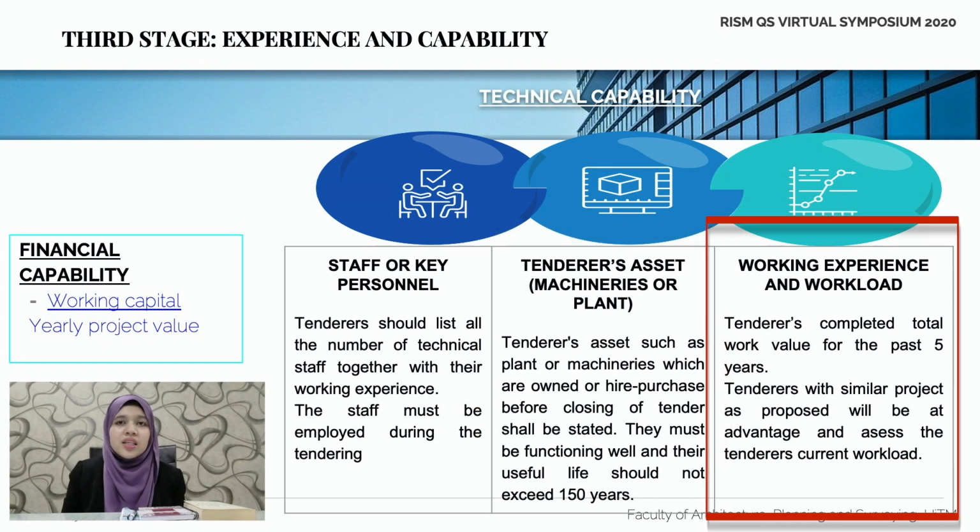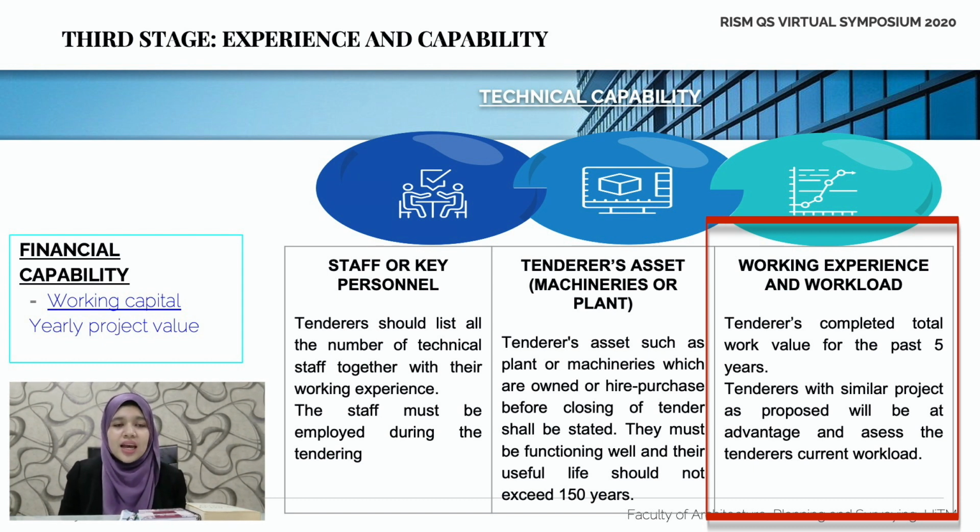And their working experience and workload shall be in the total work value for the past 5 years. And it will give an advantage if the tenders have a similar project to the proposed tender.